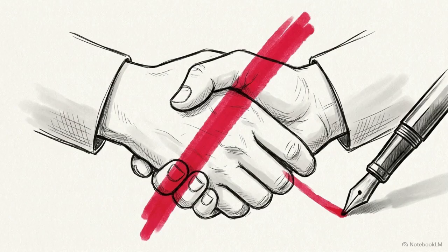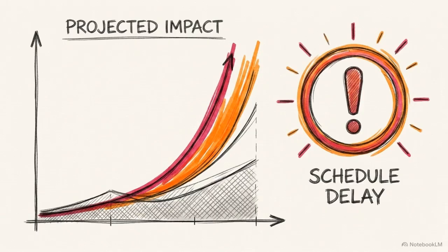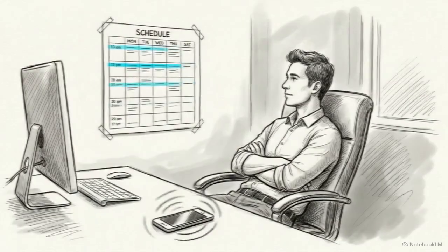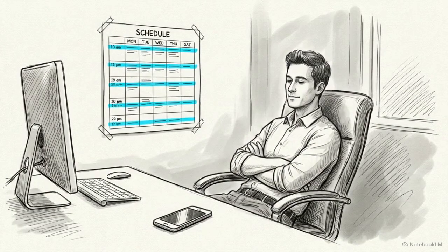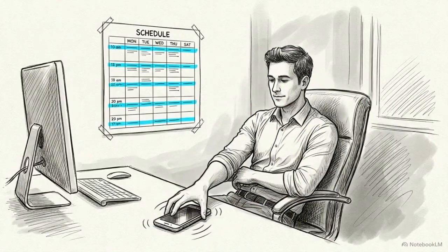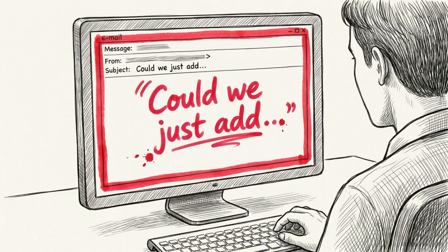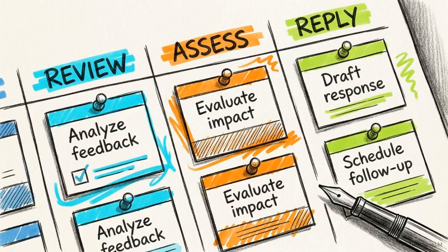Instead of relying on instant verbal agreements or trying to over-deliver in the background, pause. Run every single request through a formal impact assessment to calculate exactly how it affects your budget and schedule. Forcing this internal pause stops you from giving away free work, preserving the value of your expertise and the integrity of the project plan. When an assessment confirms a request is out of bounds, you must communicate that to the client. We use a 3-part framework to say no while keeping the relationship intact.